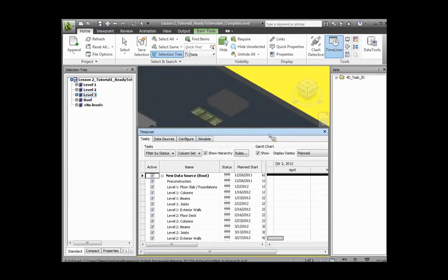Okay. So, as you put together a timeline, that schedule activity data can come from any number of things. It can come from Primavera, it can come from Microsoft Project, it can come just from Excel. I tend to just do them in Excel as a CSV file, but it can be whatever. All you really need is task names, start dates, and end dates, and then you associate activities with those tasks. So at a high level of that, yes?